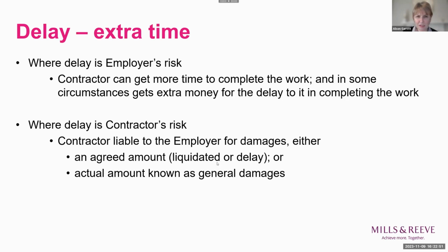And before I go on to actually deal with the top tip, I want to give you some of the background. First, and Catherine has touched on this a little bit already, where you have a delay which is an employer's risk, so wider than an employer's responsibility, then the contractor can get more time to complete the work that it was due to undertake, and as a result will not have to pay delay or liquidated damages to the employer. And I'll come on to talk about that in a bit more detail in a moment.